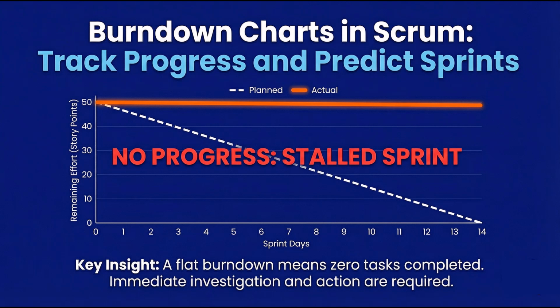Real-world fix. I had a team with this pattern. Turns out they were all waiting on a database admin to provision a testing environment. In the retrospective, we established a blocker resolution protocol where blockers get escalated within 2 hours.